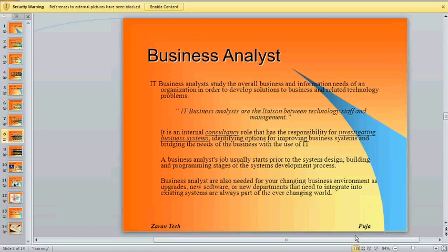So same goes. If they can't pay for this solution to be built, do we want to charge them for our services to build, or go ahead and build something that they can't pay for? No, right? So we must do all of that. Then once we've understood the scope of it, we know roughly how much it's going to cost us. Then we do a return on investment analysis, right? Is it even worth it? Yes, it will meet the objectives. Yes, this is how much it's going to cost us, but really, is it worth spending $500,000 on this solution? What is the benefit that you would receive? If your benefit is only 20 grand, really, do you want to spend 500,000 on it? Right? So we do that.